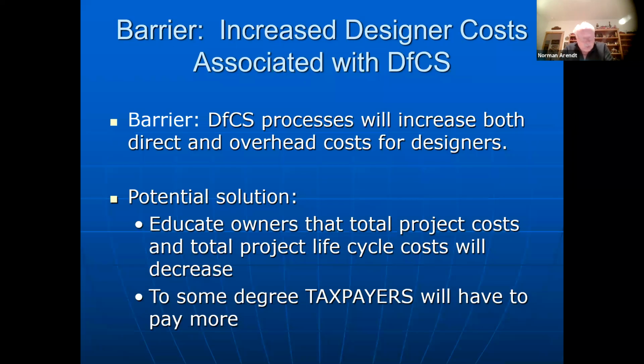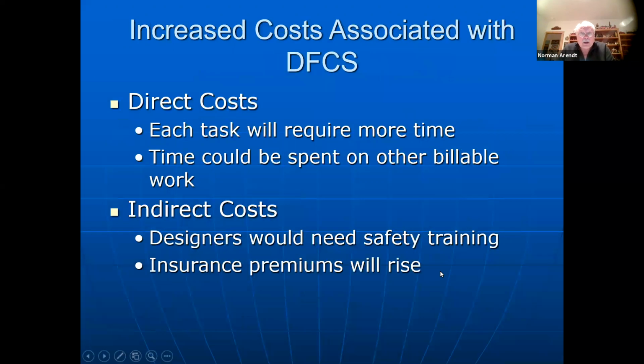And one of the real problems when we look at public projects is that a lot of those projects are low-cost projects. And that can be a real issue when we start looking at constructability and safer designs, because no one wants to pay more. For some reason, it's easier to do on the private side than it is on the public side. Direct costs, each requires more time. It could be spent on other billable work. And for anybody who works for an engineering firm or an architectural firm, you can only bill out your billable time.